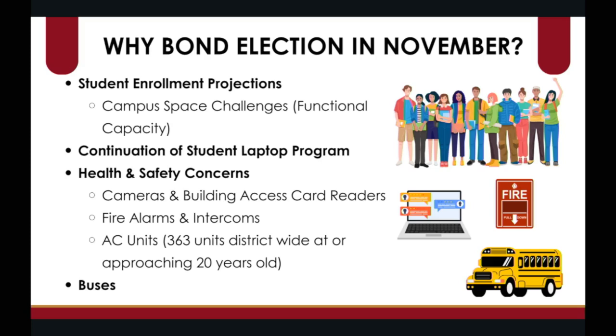One of the things about construction in a school district is when you build a school, you don't build a school completely out in its initial phase, which most districts don't because you don't have the student population to do it, so you kind of build out a school in phases until it's complete. And all of our schools have been done in phases. With that, then you start piecing things together, which causes issues with fire alarm systems and intercom systems and stuff because you're constantly trying to keep connecting the chain instead of having it all connected at one time when you first built.